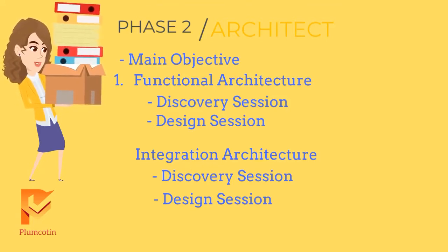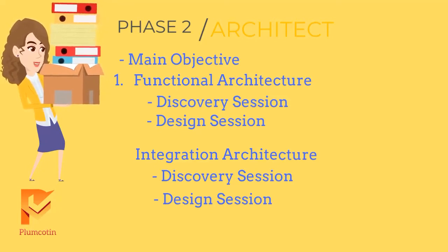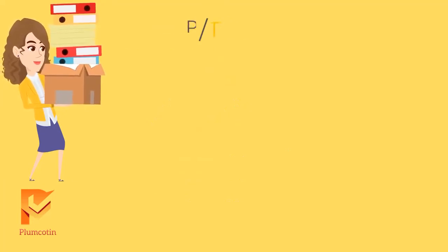Detailed design sessions in which business requirements are gathered, design decisions are made, and the inputs required to configure Workday are captured. For each integration in scope, discovery sessions will be used for initial integration specification requirements gathering. Upon completion of these sessions, design documents will be created for each integration.